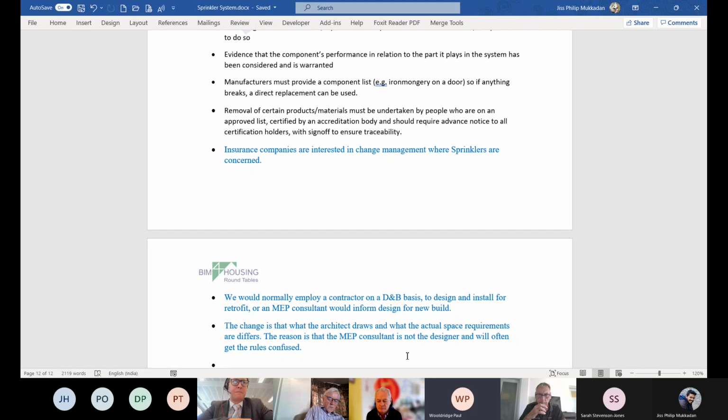So the reason we're reviewing our requirements is there's statutory guidance, and then if you've got developments going on which are GLA funded or other forms of funding, you've got to look at the conditions around that because there are different requirements. It would be an awful disastrous mistake to get to the point of handover or something and then realise that you're going to have a great chunk of your funding removed because you haven't complied with the guidance, even though you're statutory and legislation-wise correct.